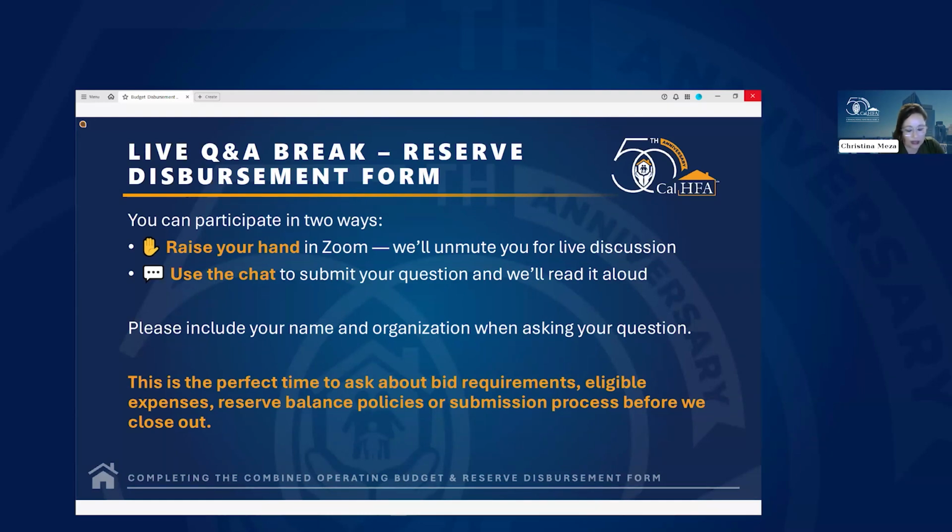If you're doing it throughout the year or throughout multiple months and it's invoiced separately and it's under the threshold, a bid is not required. If it is being done throughout the year and it's invoiced all at once, a bid is going to need to be required. Please let me know if that clarified it.